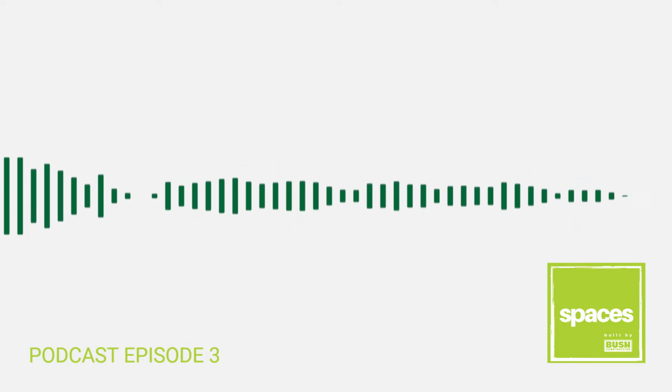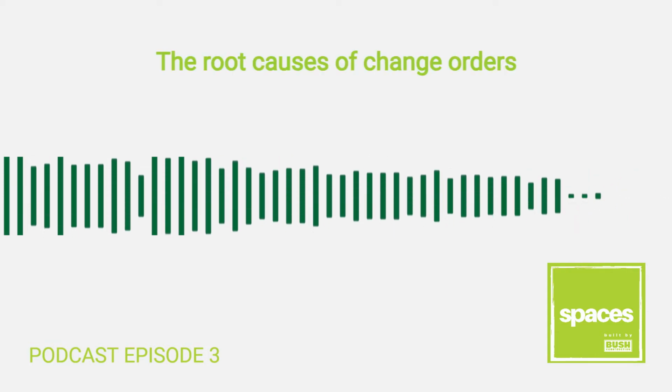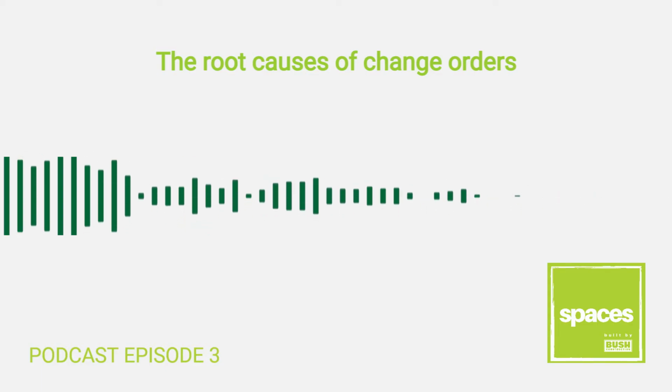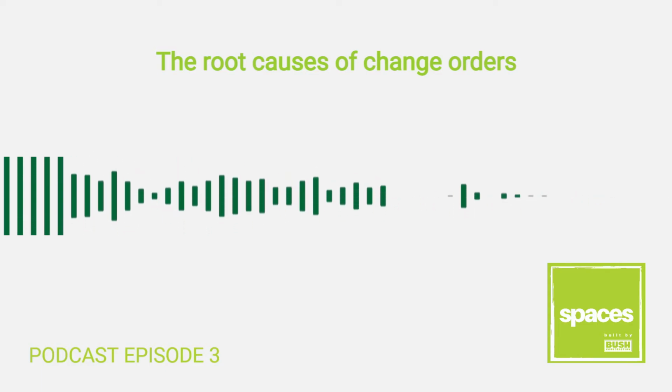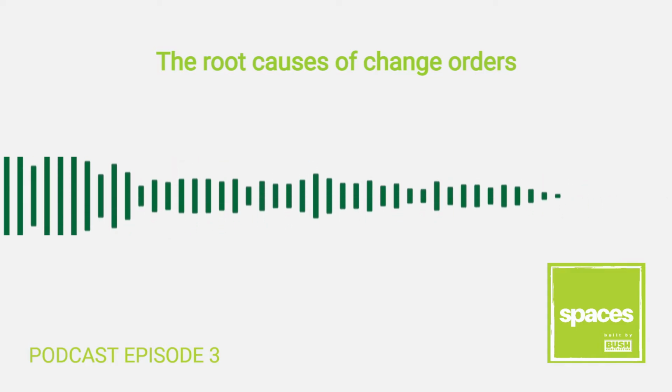So what is the root cause of a change order? Yeah, it's typically a design ambiguity, omission, or it could be just the fact that something isn't constructible, like everybody had anticipated during the design phase.